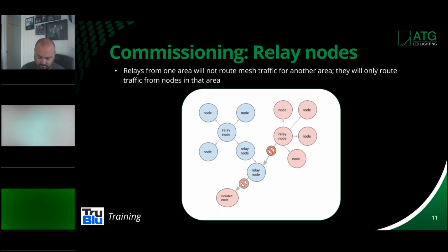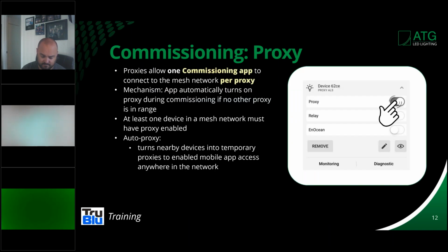Okay. Now, it's also important to understand that relays work only in the area that they are located. They do not jump from area to area. So, if you have two parking lots, you may have to set up relays in each of those areas. So it's important to keep that information as well.